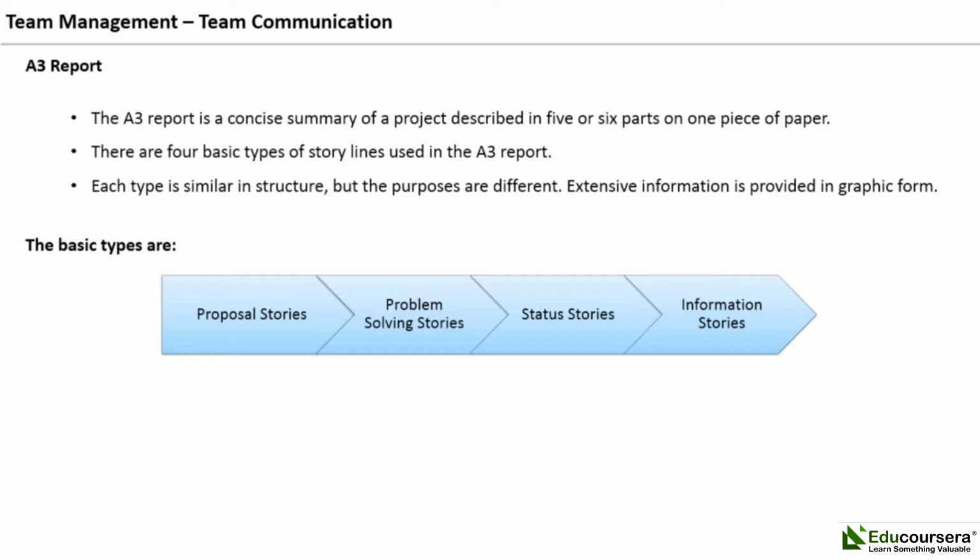The report format fits the problem-solving stages onto an 11-inch by 17-inch sheet. For example, the problem definition and analysis stages would appear on the left side of the paper, while the action plans, results of activities, and future steps will appear on the right side. The following are some key concepts for A3 report writing.